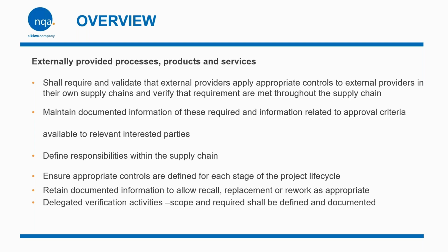And you have to delegate verification activities. If verification tasks are delegated to external providers or subcontractors, they must have a clear scope of the requirements, and these delegated activities must be clearly defined and documented.